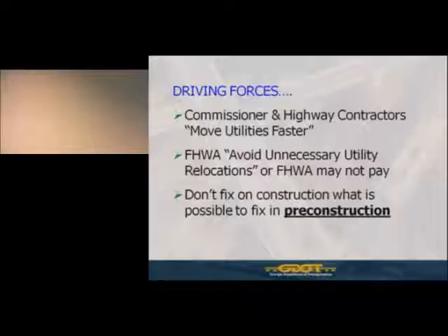What that statement means is, based on the FHWA guidelines, if they determine that the department did not do its due diligence and proper utility coordination, then they may withdraw funding from a particular project. The policy actually goes so far as, if there's a systemic issue within a Department of Transportation, they may withhold funding from an entire construction work program. This obviously would be an extreme case, but it has happened on one project that I'm aware of. We did resolve the issue and resecured funding for that project.